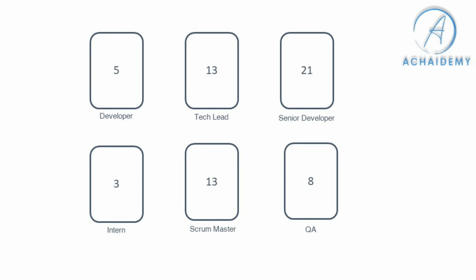So that's the session. At the end of this session, for every story a number is agreed, and that is the story point assigned to that particular user story. This is repeated for every user story during sprint planning, and even sometimes in sprint grooming, so that every user story has a story point which can be used while planning the number of stories to be picked up for a sprint.